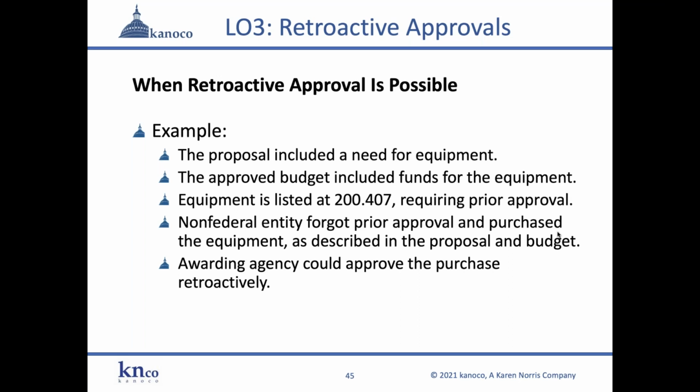Unfortunately, most of the purchase decisions are supplies and computers and smartphones and tablets, which aren't real expensive equipment. But if they're purchased as equipment and not supplies, if it's some scientific microscope instrumentation for a lab, for a research project, it needs prior approval.